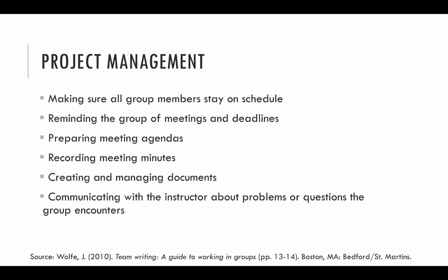According to Joanna Wolf, the person assigned to this task, often called the project manager or the team leader, should be responsible for making sure all group members stay on schedule, for reminding the group of meetings and deadlines, for preparing meeting agendas, for recording meeting minutes, which can then be used to hold the group accountable for decisions made in person, and to update members who miss meetings, for creating and managing documents such as team charters, the task schedule, and drafts of the project, and for communicating with the instructor about problems or questions the group encounters.